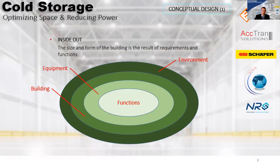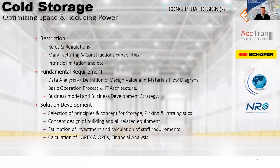Lastly, the architect will wrap the whole building with the surrounding environment together, and that will give you the whole concept of the project. You may ask: sometimes people find a building already there and start defining the process inside to fit within the four walls, and that becomes a constraint. You can do that — there's no right or wrong — but you may need to go through a longer design process, and some functions required by your business operations may not be achievable.